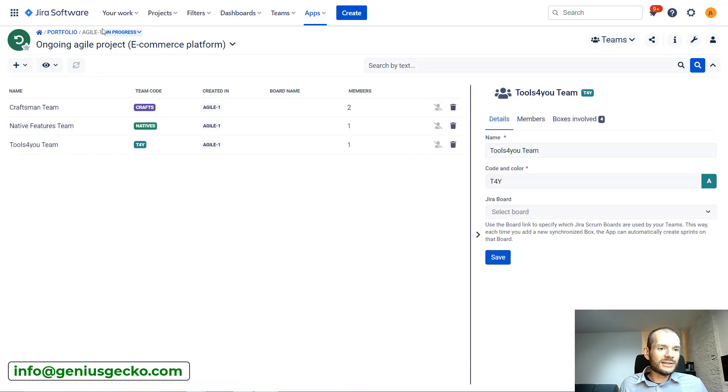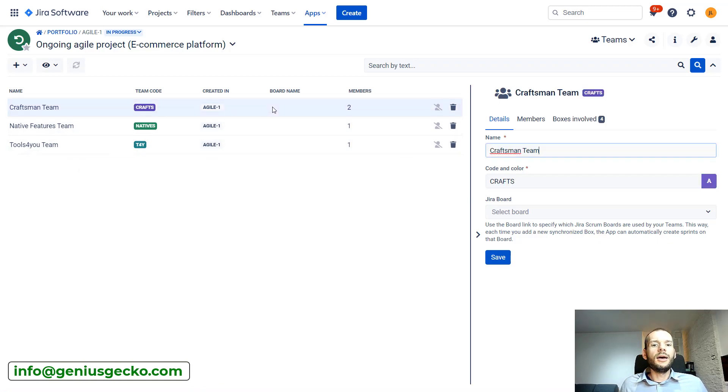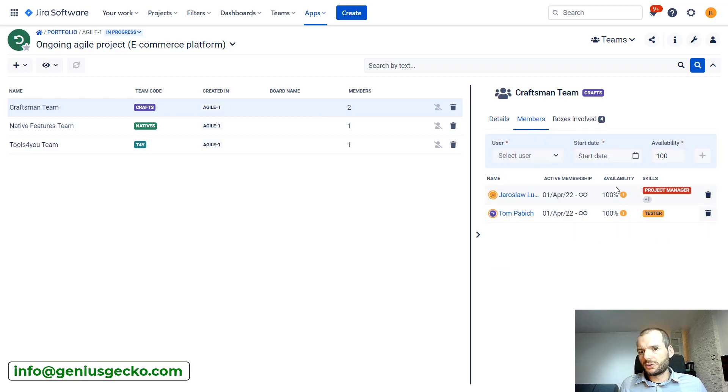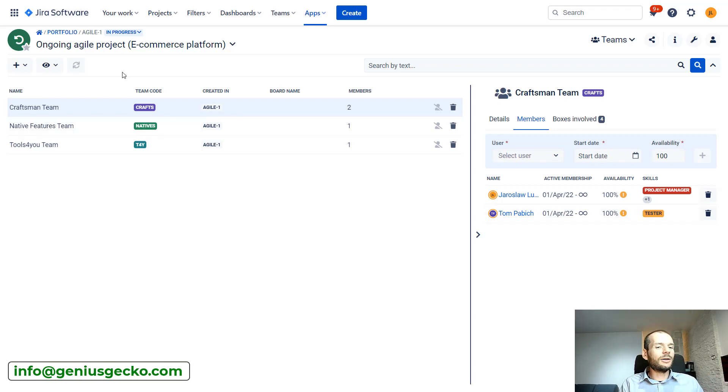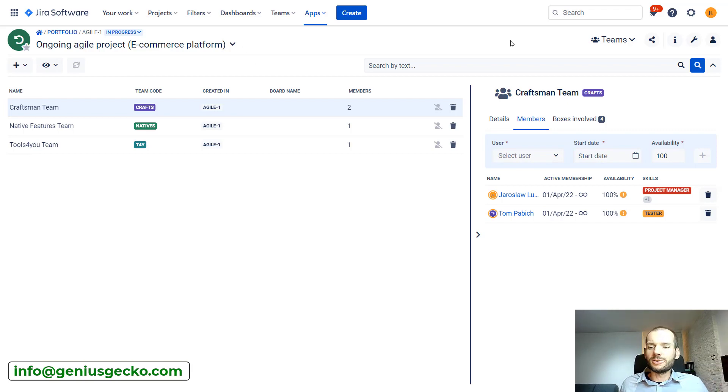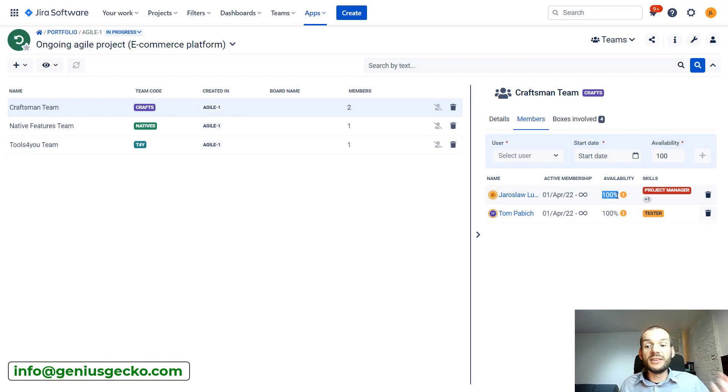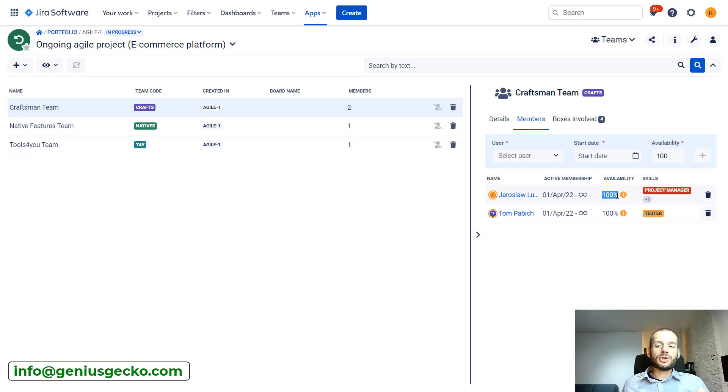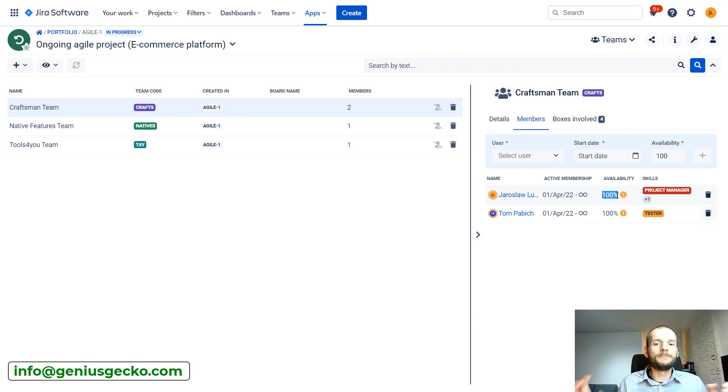Let's have a look at the teams. You can see over here I have three teams. Two of them have just one member. One team has two members and both of these numbers are working for 100%. In Big Picture there are also worker plans, holiday plans that define how many hours per day people work. Based on that and the information about how many percent they are assigned to the team, Big Picture knows how many hours per week a person has, their weekly capacity.